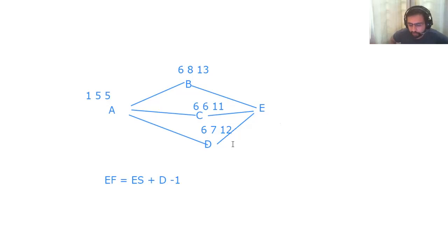Now in order for E to start, all three activities B, C, D has to finish. C will finish on the 11th day, D will finish on the 12th day, and B will finish on the 13th day. So E can only start when B, C, D are finished. So E will be starting on 14th day. So we will have its early start as 14. Duration of E was five. So 14 plus five, 19 minus one, 18.